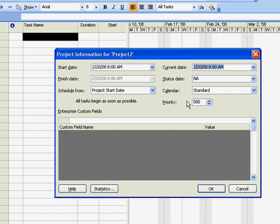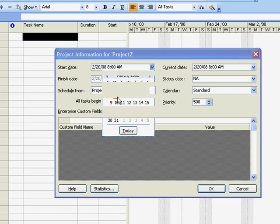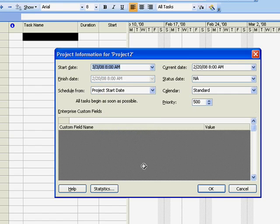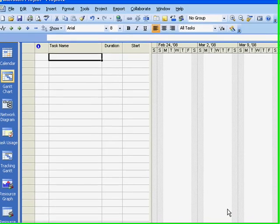If your project is going to begin at some future date, or if you have already been working on the project, change the start date. You will see that Project uses the start date for scheduling the first tasks of a project.